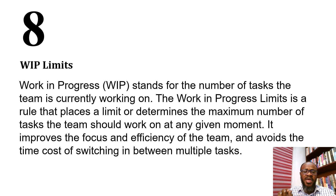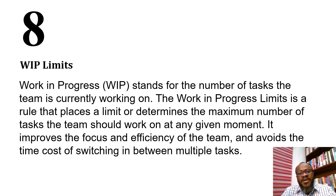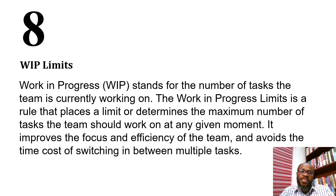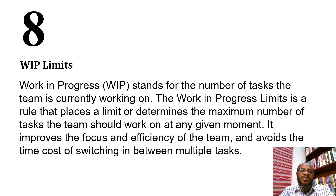The WIP limit improves focus and efficiency and avoids the time cost of switching between multiple tasks. In the Scrum framework, time-boxed sprints naturally fulfill this purpose. It is Kanban that primarily utilizes WIP limits, because Kanban is feature-driven and not time-boxed — so a limit is needed to prevent the team from stretching themselves too thin across many tasks.